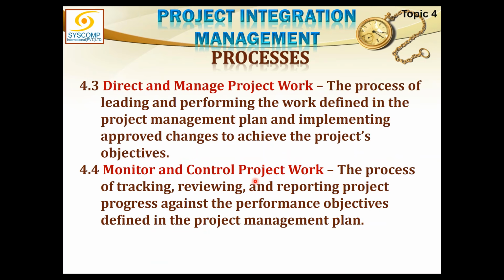This process is leading and performing the work defined in the project management plan and implementing whatever change requests have been approved. But where are these change requests coming from? It is not the responsibility of this process to approve the change requests. Yes, it can request certain changes, it can move a change request, but as far as the approval of the change request is concerned, that is not the job of direct and manage project work, and therefore it depends for that on the next process, which is monitor and control project work.